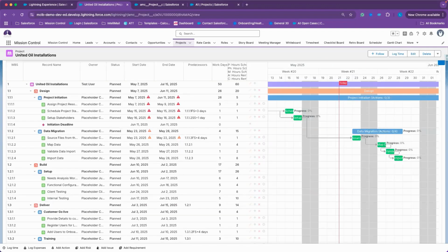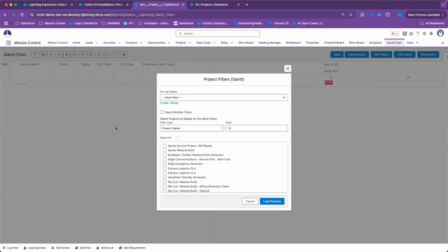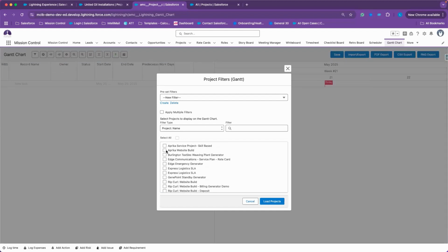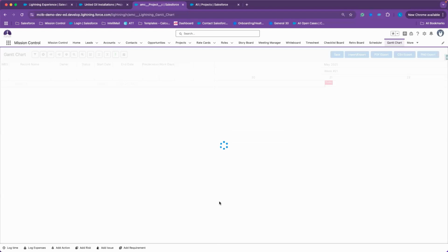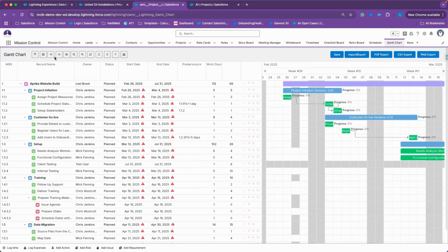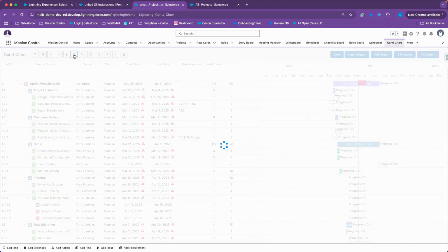All right. You have the ability to specify both a parent and a child from the phase, record, milestone, action, checklist item, and you can also choose to have cross-project dependencies. Now, this will only occur if you are using the standalone Gantt chart and you have multiple projects displayed. Then you can begin to create inter-project dependencies. You might want to collapse your sections to be able to view this.